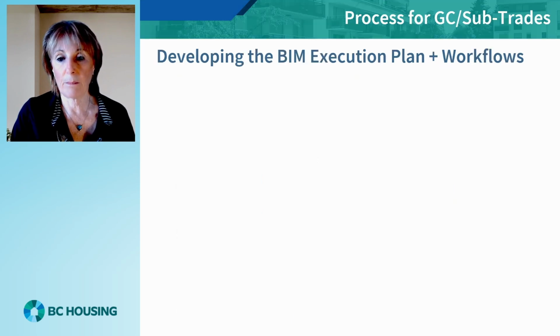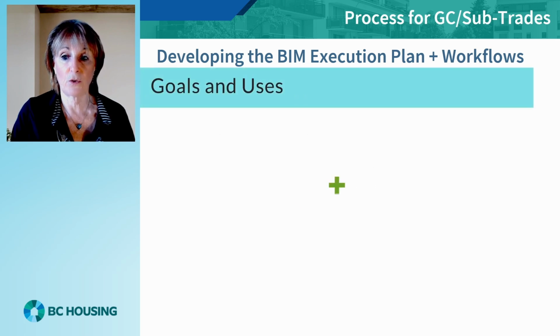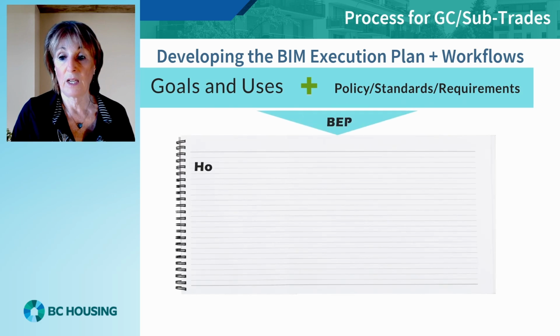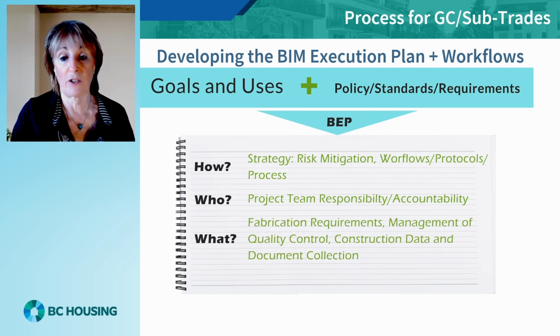Remember, the BIM execution plan is the document where the construction team proposes their strategies and workflows to achieve the goals established in the BIM requirements by the owner, as well as their own internal goals. How will you achieve the goals and uses? What are the workflows, protocols, etc.? Who is going to be responsible for what? i.e., what as a GC will you undertake and what will each trade be responsible for?